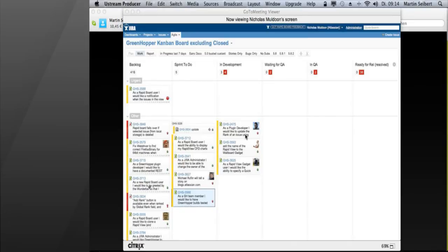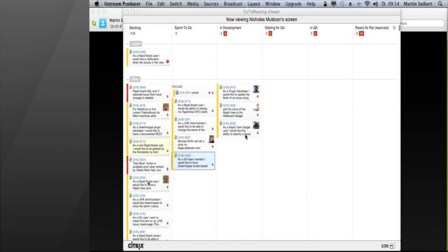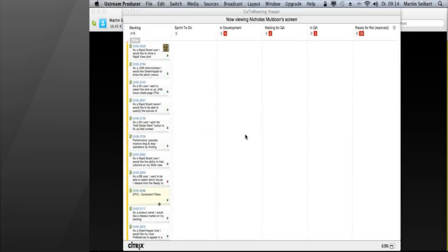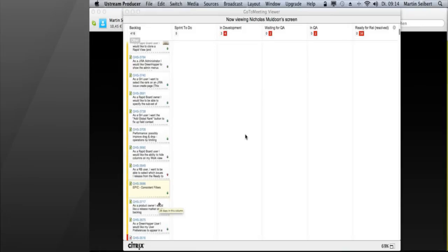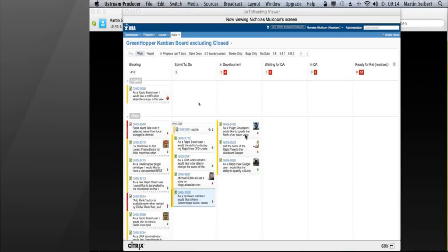And of course you can see here in our backlog column that nearly all of these issues have a full number of dots here. They probably have 30 days or 40 days, so 26 days for this particular one. And that shows that that particular issue was created nearly a month ago. So this is really unusual for a Kanban team. It's really unusual to have such a large backlog, and it's just in light of the fact that we have a public backlog that so many issues keep getting put into it, and we need to go through every couple of months and close a whole lot of them off.